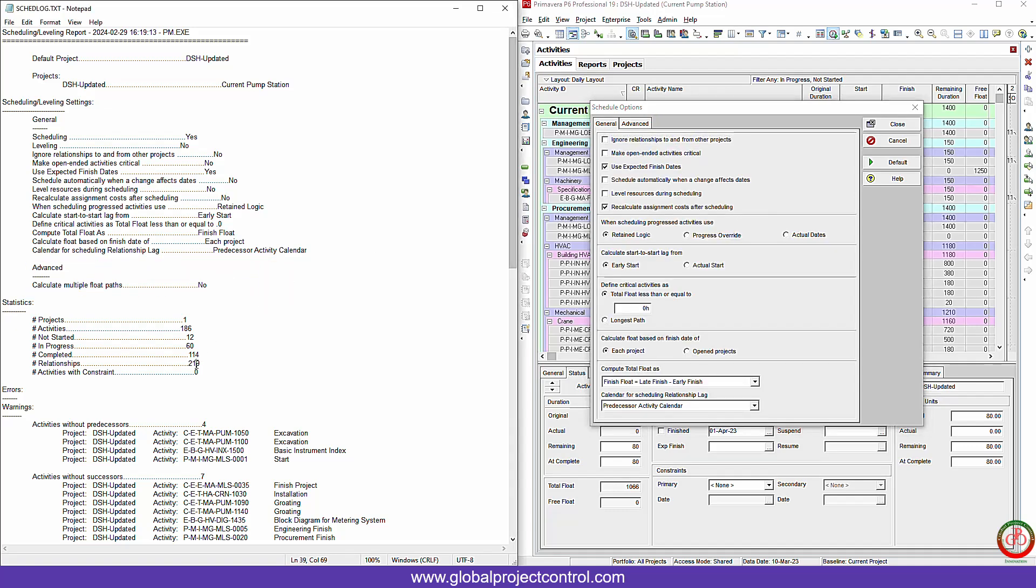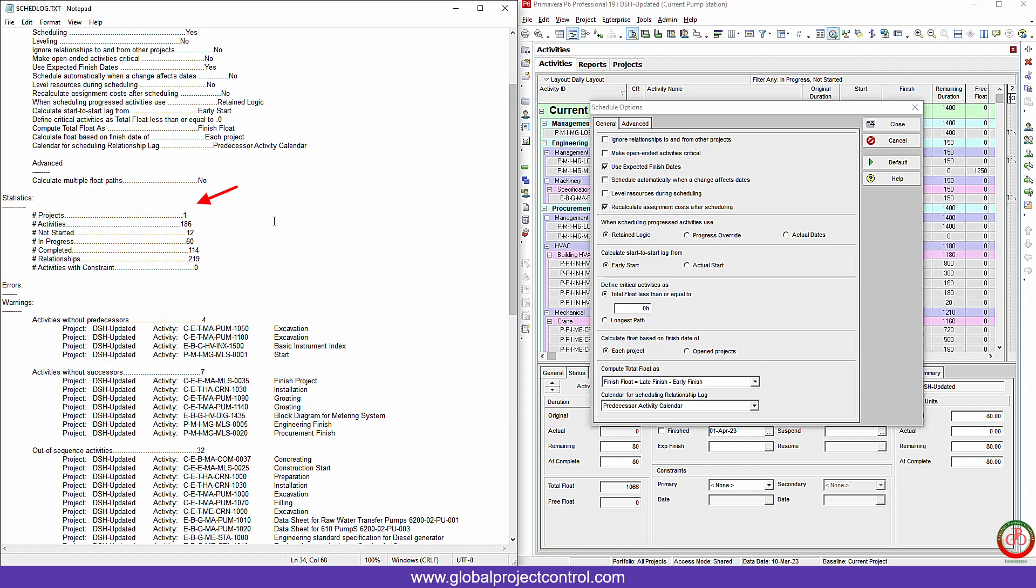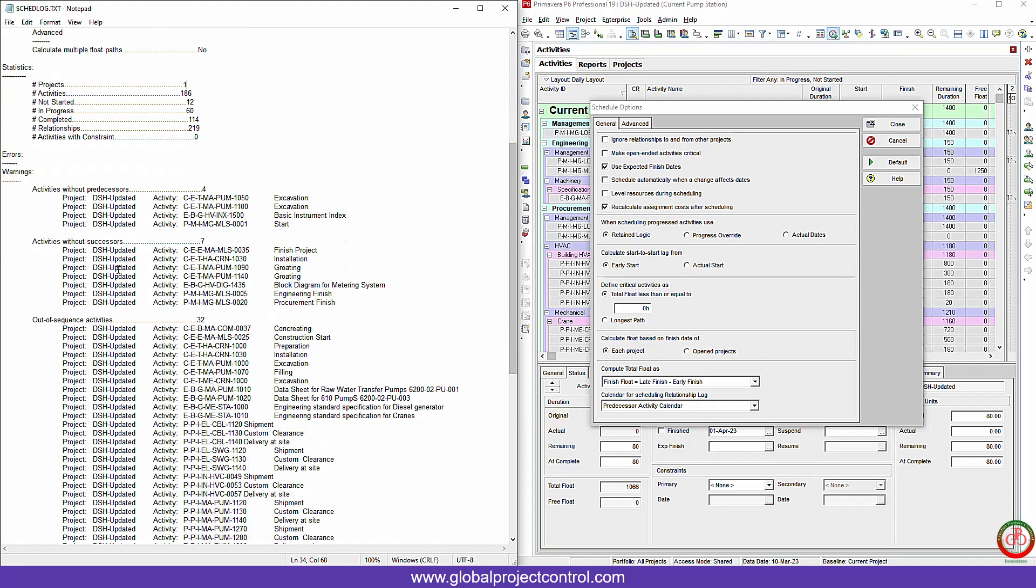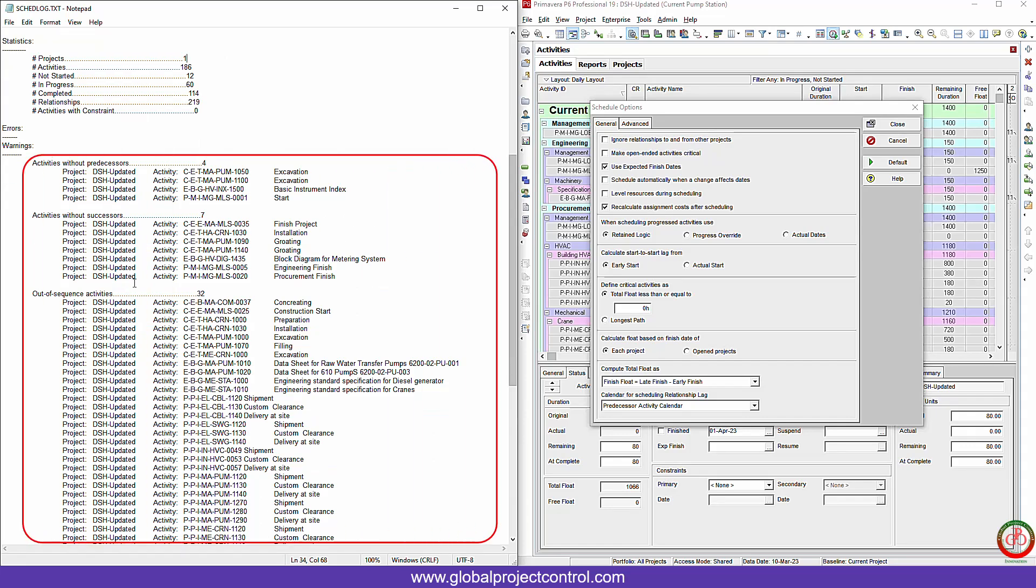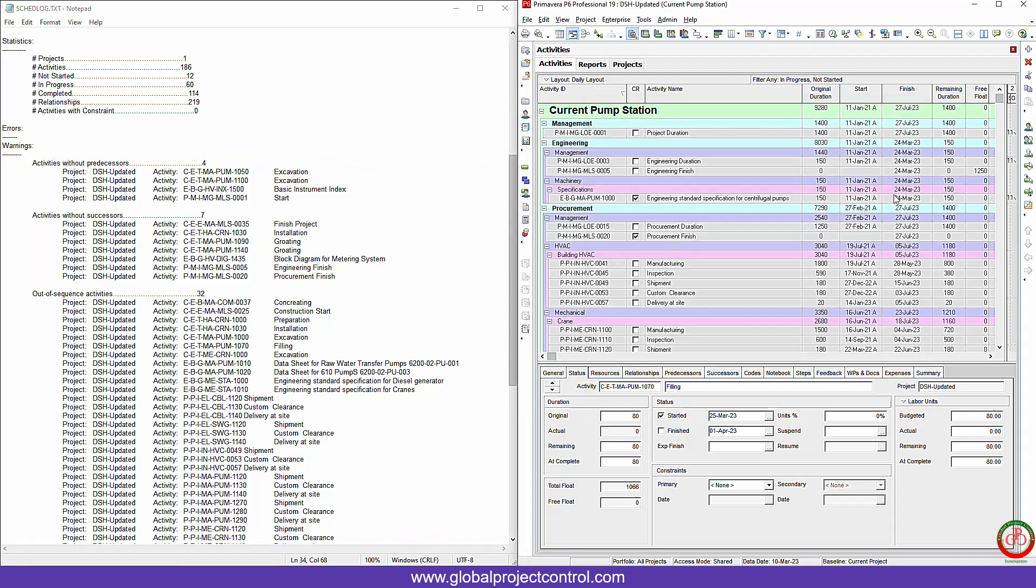Rest of this is the statistics information over here. How many projects you already opened, how many activities you have in the project: not started, in progress, completed. How many relationships you have and rest of information. But this one is mostly useful and regular checking for the health of schedule: activity without predecessor. On the schedule we only allow to have one predecessor free task that will be the start of the project. Rest of the activity need to be connected to each other.